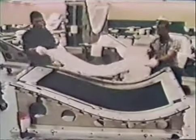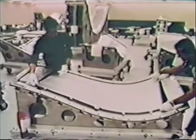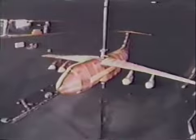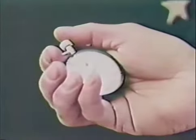The Avco outer wing sections must mate exactly with wing tips, leading edges, and ailerons manufactured by Canadair Limited in Montreal. We're doing nicely, but I must admit it's only due to the extreme project cooperation. You see, we started out with a high lift system. Then, rather late in the game, but as a result of continuing wind tunnel testing, Lockheed engineers found they were becoming critical on the three-engine climb out. They wanted to trade off some lift capability for some freedom from drag to improve that climb rate. So they shifted to a Fowler flap system, which also changed the slat design.